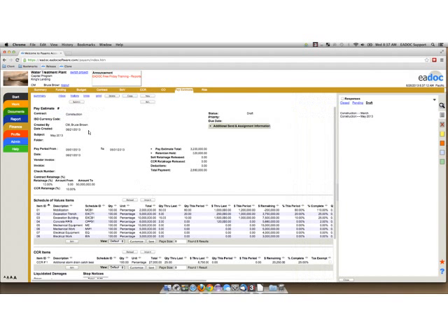So that can drastically simplify your pay estimate data entry, especially if you have 100 line items. The inspector already checked off to see how much was done, and then you just want to import those quantities into the pay estimate. It can be really helpful.